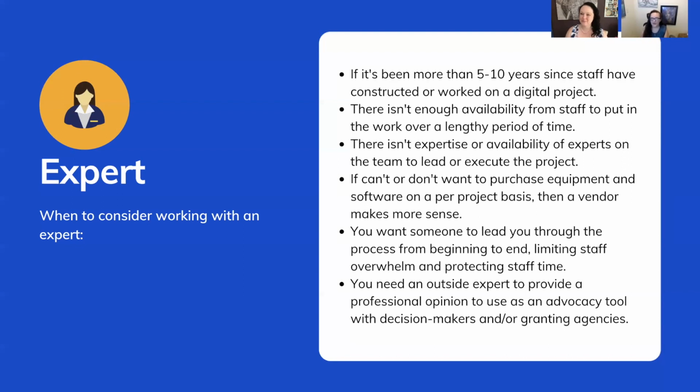And one other thing is protect your staff's time. It may not seem like it would take a lot of time to scan something, but it takes more time than one expects. And so if you need to bring in an expert to say, this is going to take X number of hours, so you can allocate staff for that, or even think about bringing on a staff member just for that, that is also really helpful for your organization instead of trying to muddle through if you don't know the process. Yes, excellent point.